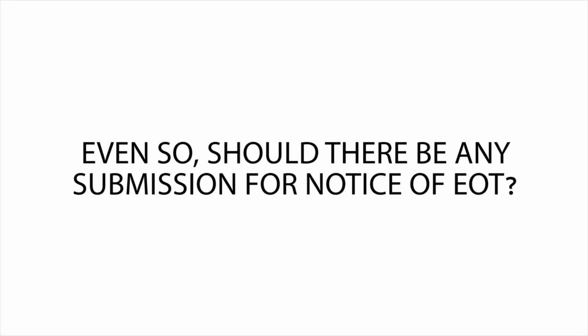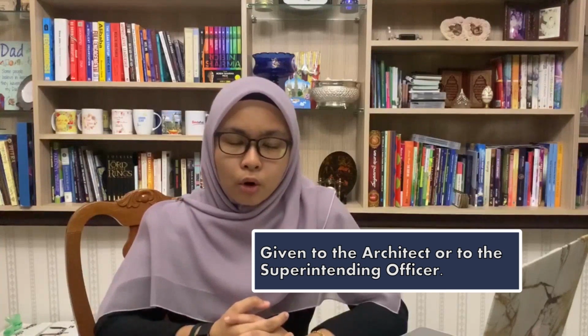Based on EOT notice clause number 3 by Pekeliling Pembendaharaan Malaysia, eligibility to claim for an extension of time is automatically granted for government contracts. For both contracts, notice of EOT shall be given to the architect or to the superintending officer respectively within the specified period.